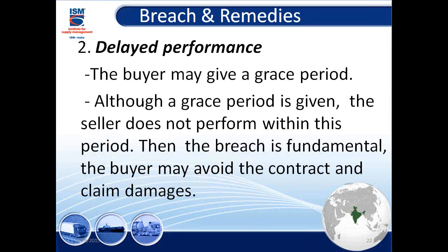Delayed performance. The buyer may give a grace period. But I'm sure, those who are from the public sector, they have to get approval from the competent authority also. You can't just say, okay, sorry, I give you another 1 week. So in the public sector, you have to get in writing from your competent authorities whether you can authorize 1 more week or not. Even if the grace period is given and the seller does not perform within the period, then the breach is really fundamental, and the buyer may avoid the contract and claim damages for that.